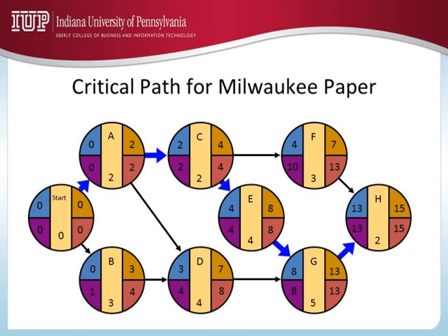Let's do B. B, only activity dependent on B is D. So very simple. Take this 4. That will be the latest start. 4 minus 3, 1. What is dependent on A? C as well as D. So I have to take the minimum latest start time of C and D, which is 2 and 4. So that will be 2. 2 minus 2 is 0. Done.